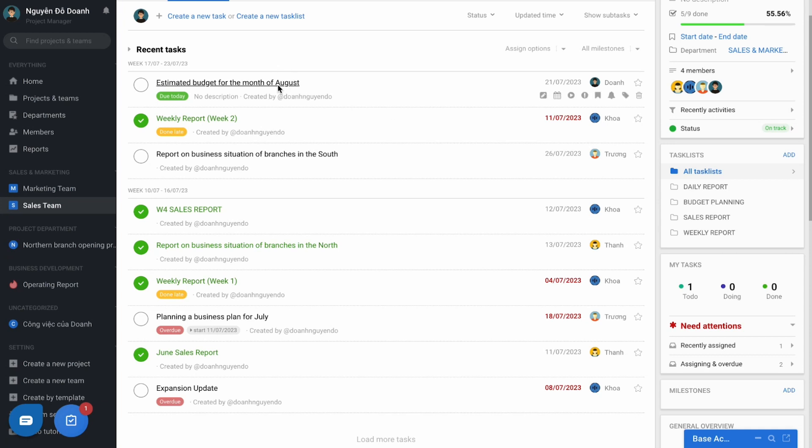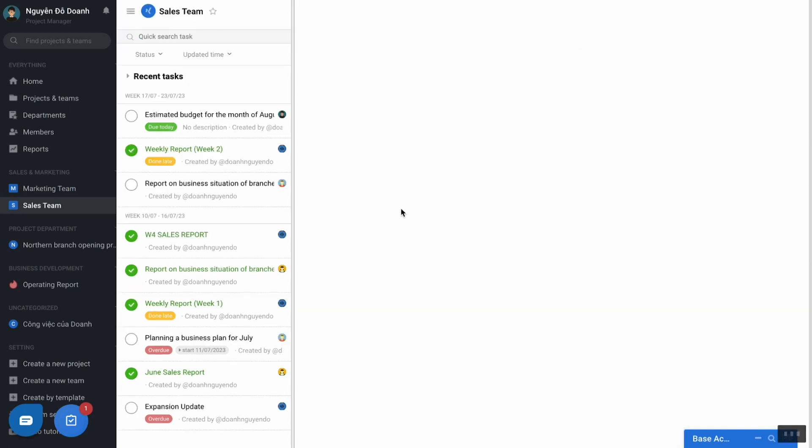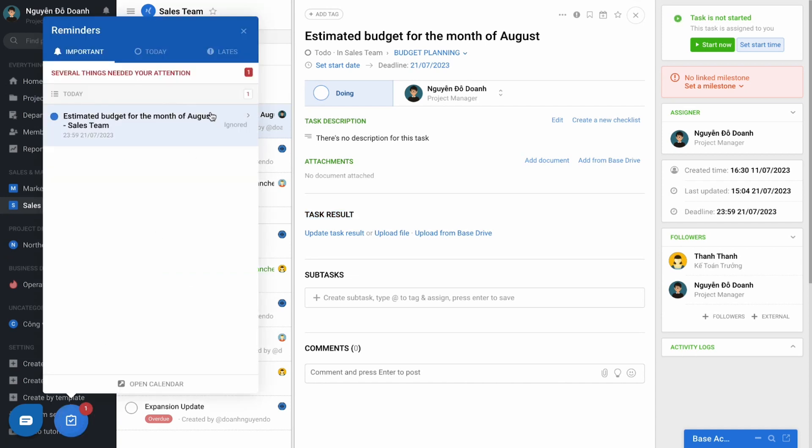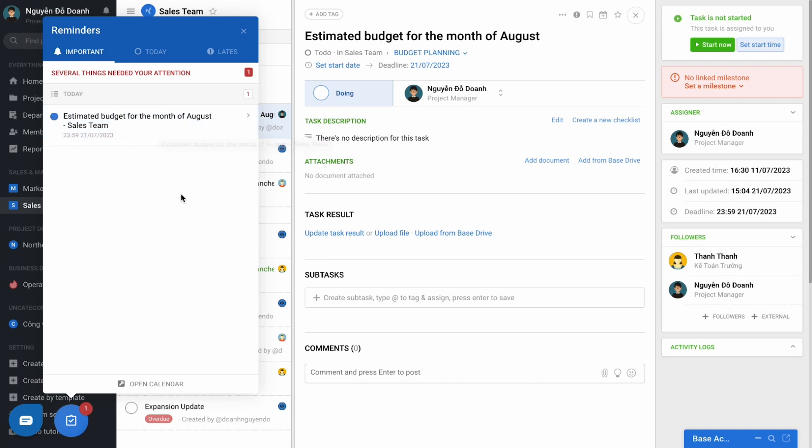Users will exchange information and report on each task flow, and based on the deadline of each task, the software supports reminding the user of what they need to do in the next seven days, which helps the user manage their workload.